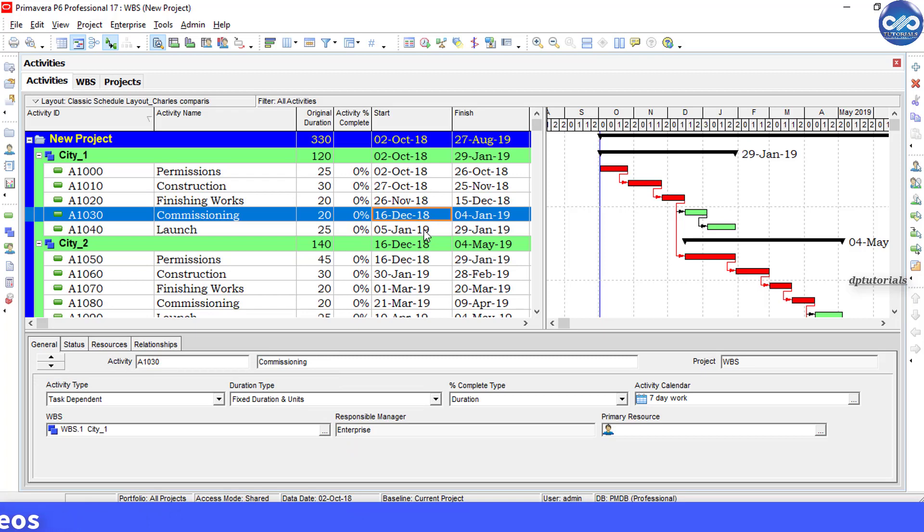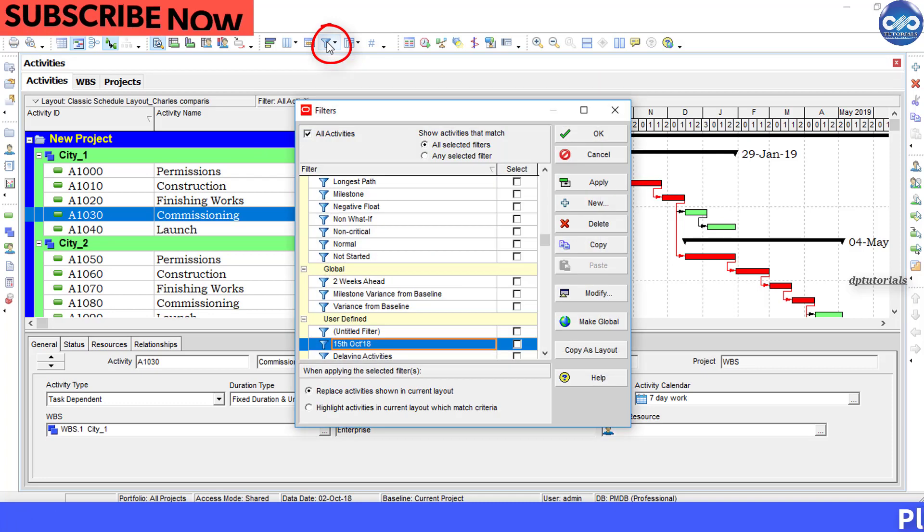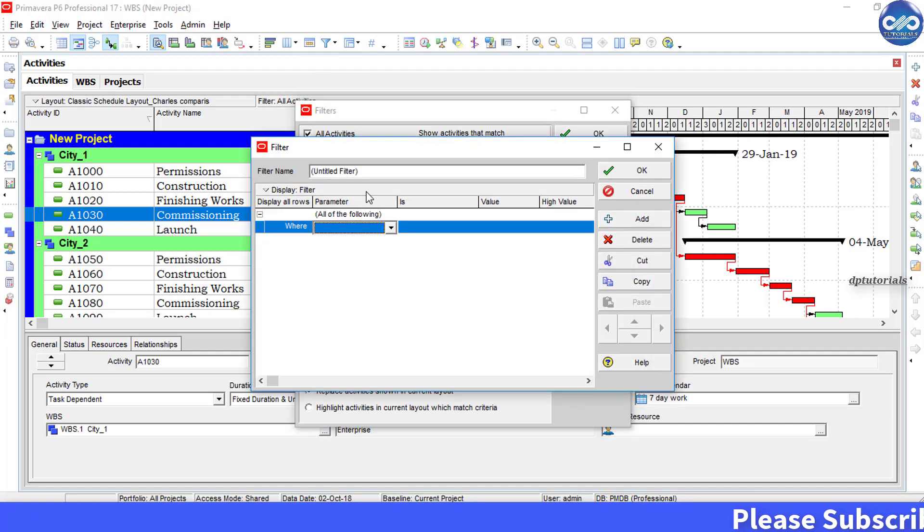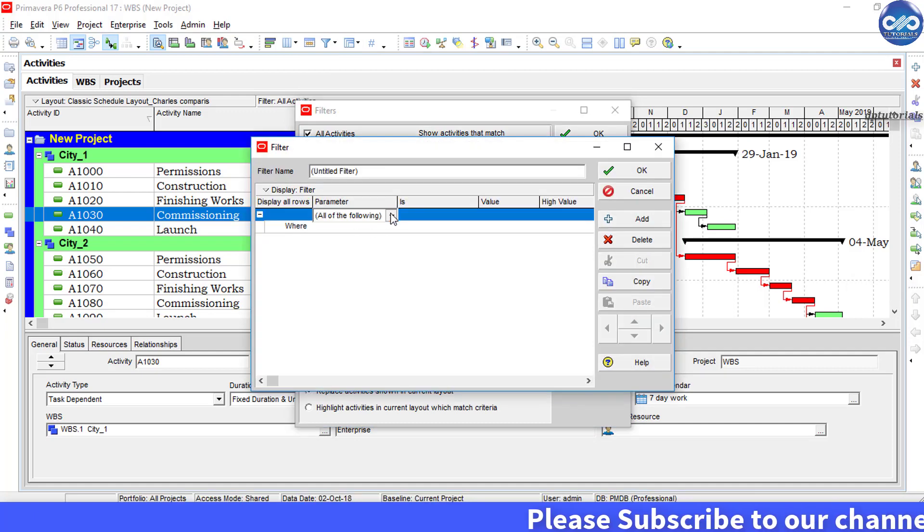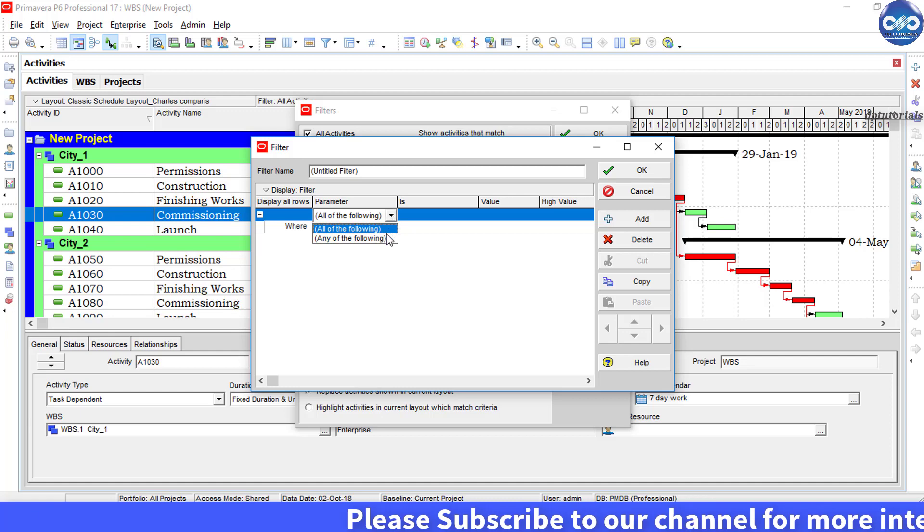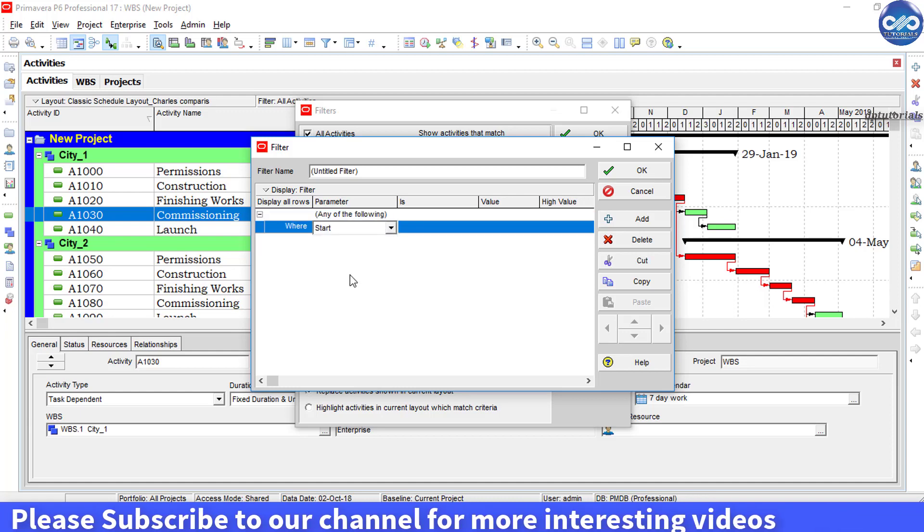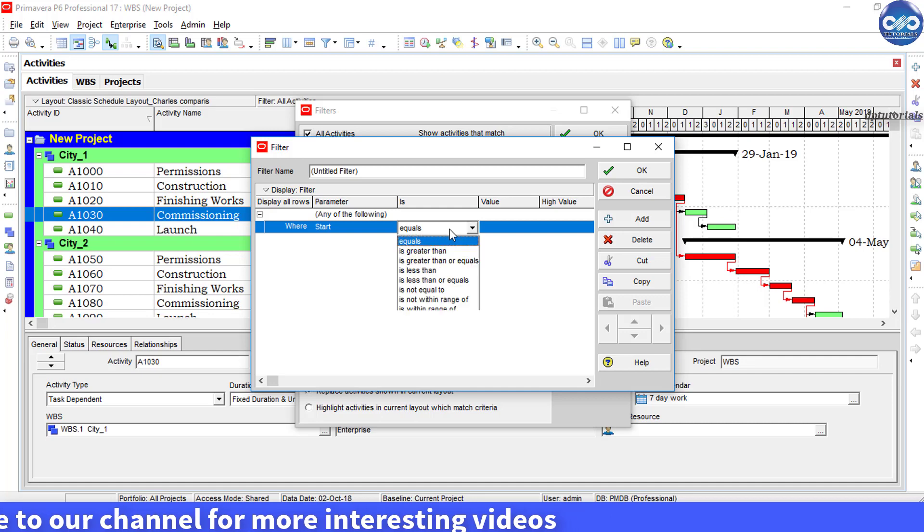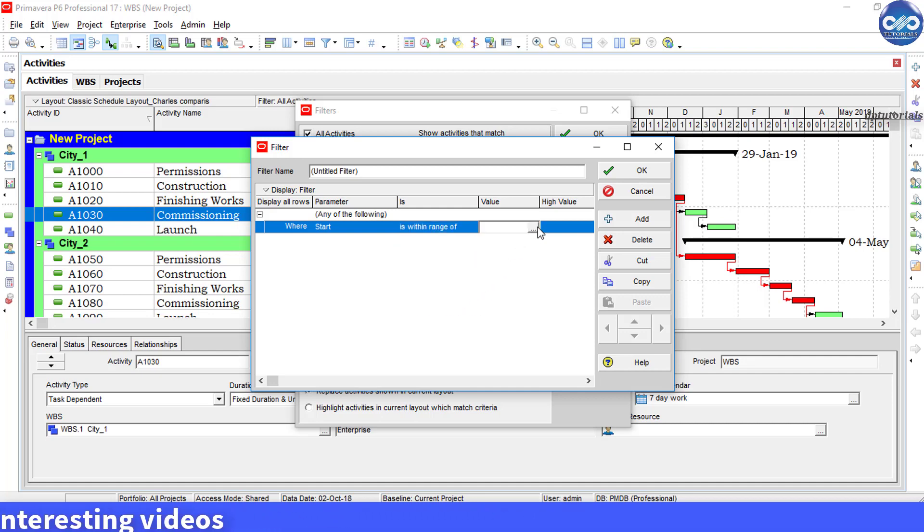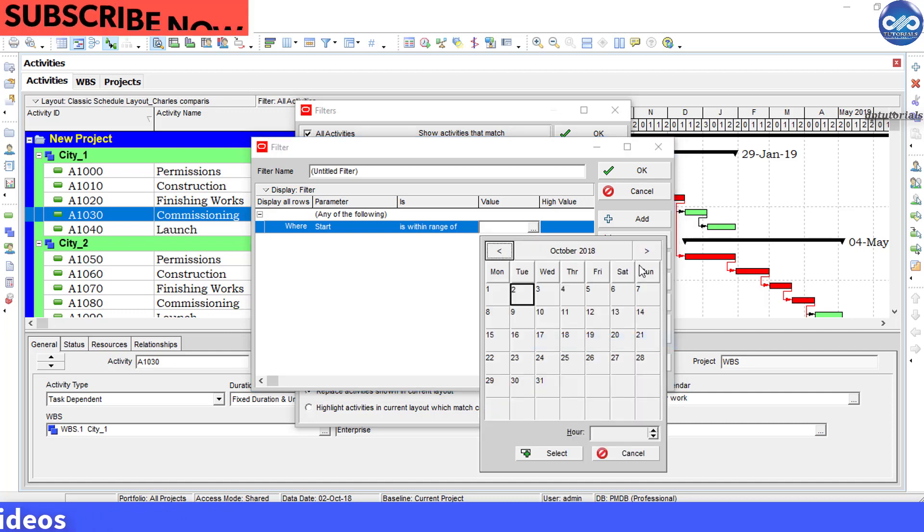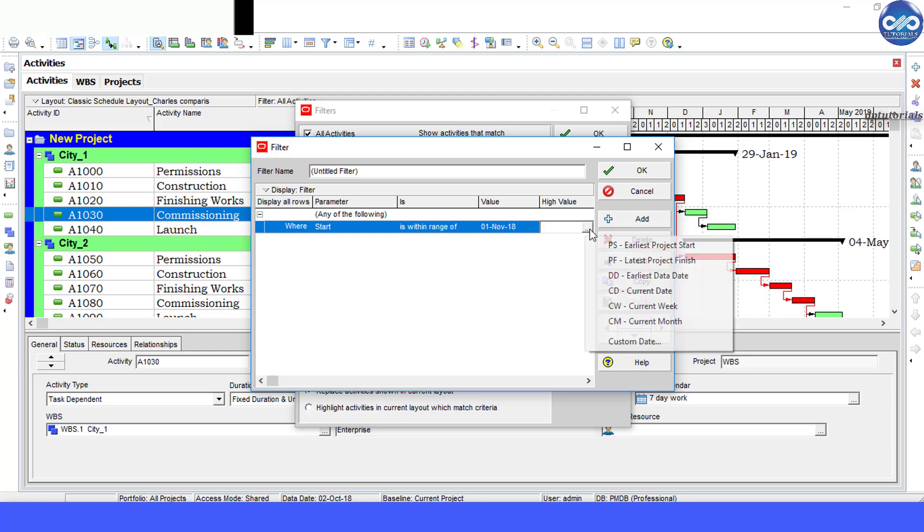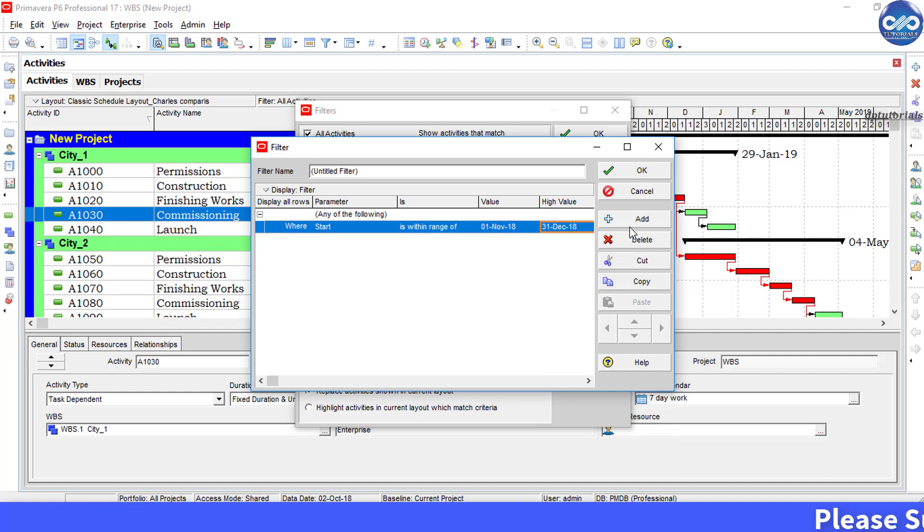Usually we'll create a filter by going to the menu bar and clicking on this filter icon. Now set the conditions for filter as any of the following: where start, select the parameter start, is within range of, the value is 1st of November and high value, select 31st December 2018.